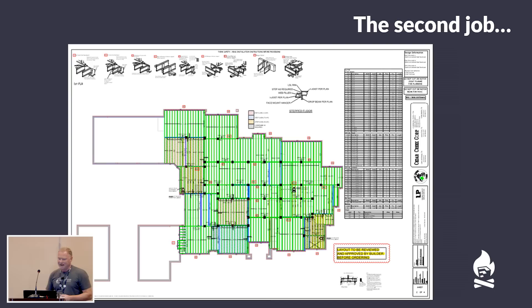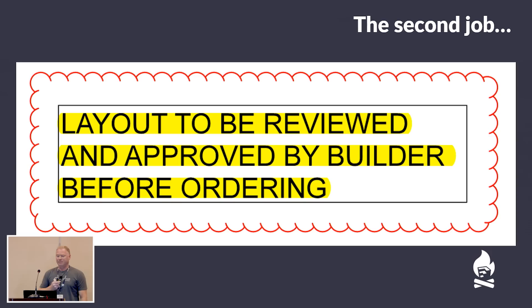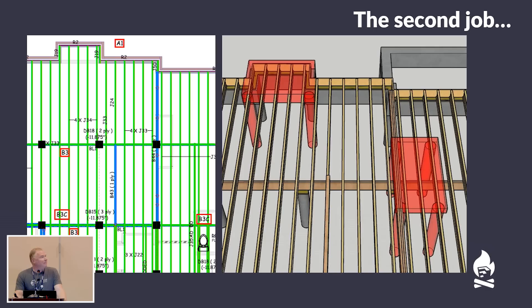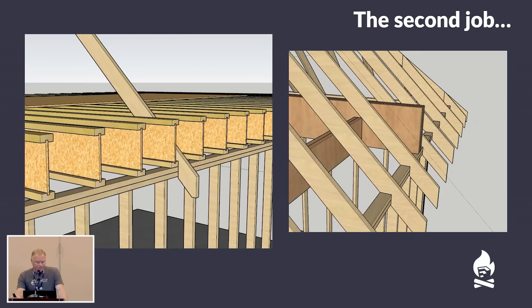He had three masonry fireplaces, a safe room, and a beautiful colored 2D drawing of his TJIs, rim joists, and LVL beams — everything labeled and dimensioned. But right at the bottom it said 'layout to be reviewed and approved by builder before ordering,' and he was getting ready to order the whole package — probably a $60,000 order. When I modeled all the TJIs and beams, I found beams and TJIs running through every one of those masonry fireplaces, which require hard slabs. We went back and got them to completely revise that before he ever ordered.